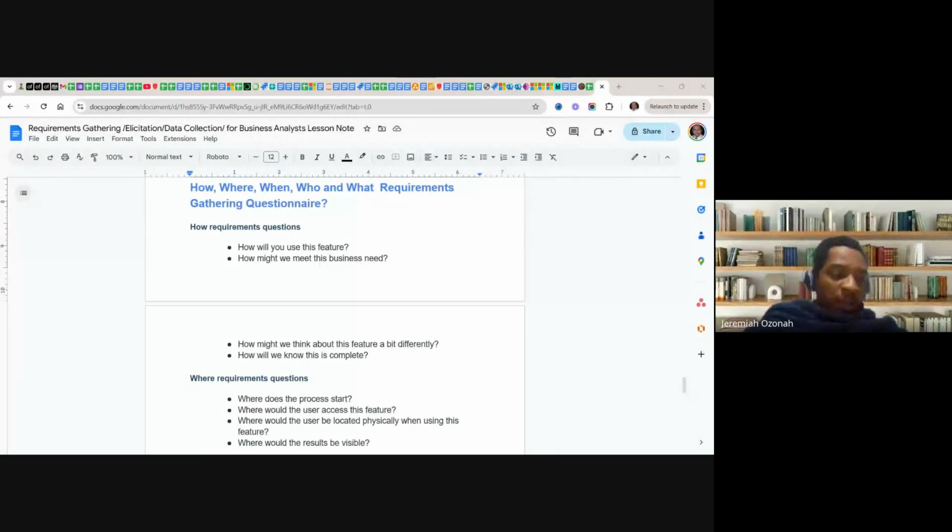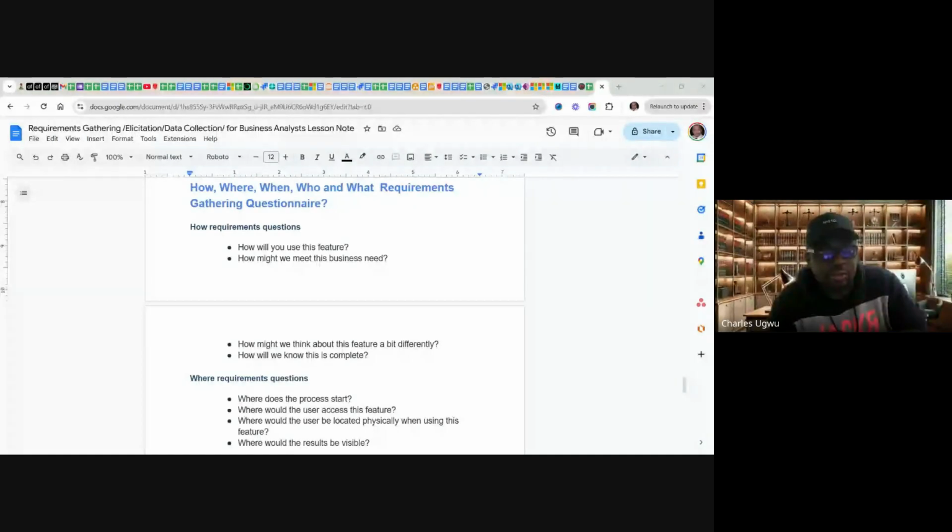Okay. Thank you, sir. I just looked at MoSCoW now. Can we also have high, medium, low in prioritization tools? Yeah, the purpose of prioritization is, as I've already told you, during the requirement gathering, look at where the stakeholders, if more stakeholders are hitting on one point, where I say commonalities, if they are requesting, they want this feature, they want this feature, they want this feature, then that feature should be prioritized.